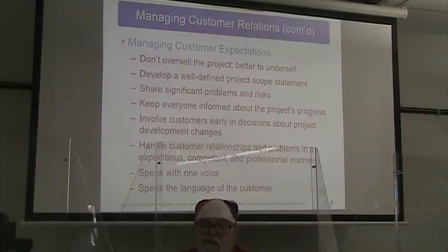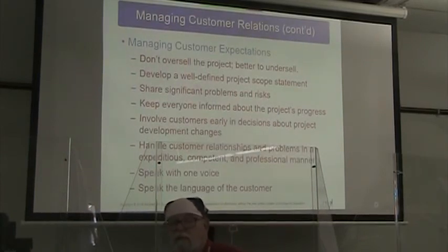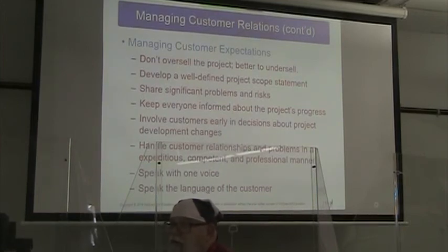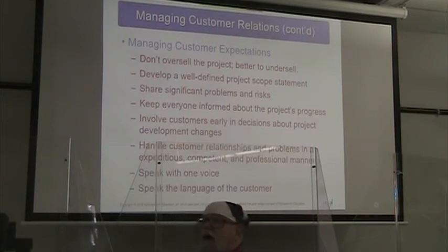Make sure that we develop a well-defined project scope statement, right? If we're able to go to the customer and they say, well, I don't know, I don't like it, and we have a scope statement, we say, well, what part of this scope statement that you signed has not been met?